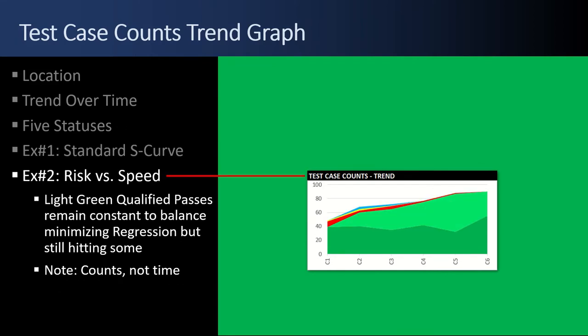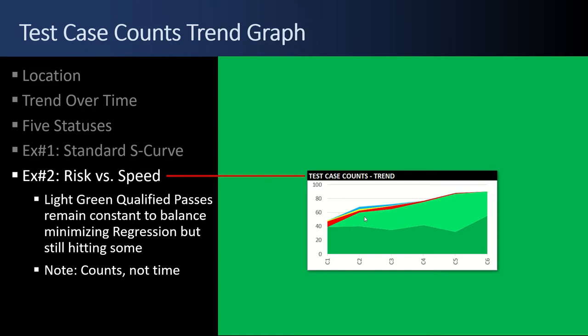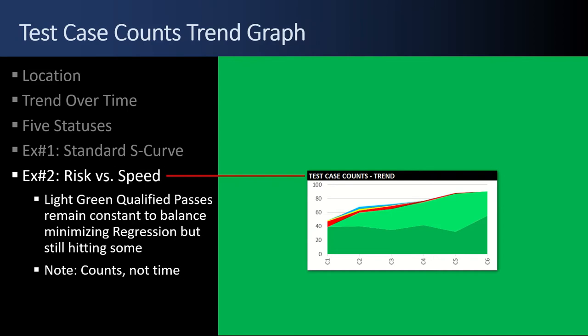Example number two. I look at this chart and know that there's a risk versus speed decision going on. Throughout all the test cycles, there's a bunch of qualified passes going on. These are test cases that weren't run. Also note that this is test case counts, not time. If it were time, the qualified passes would be zero. But it's showing you the scope of how many test cases were skipped.